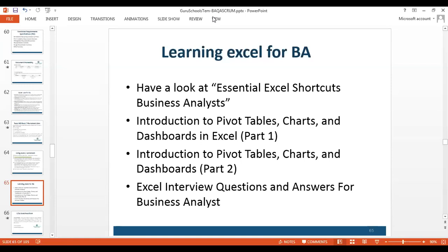So I upload this document called minutes of meeting to a company portal within my company, so that it can be distributed to the client, and I'll embed the link in my email saying, okay, I have created this minutes of meeting. Hey person so and so, please suggest if I missed out anything, or any omissions or additions, and I'll wait for the next 3 days, so that if I omitted anything, I'll add those things and recirculate again. And this happens, let's be open.